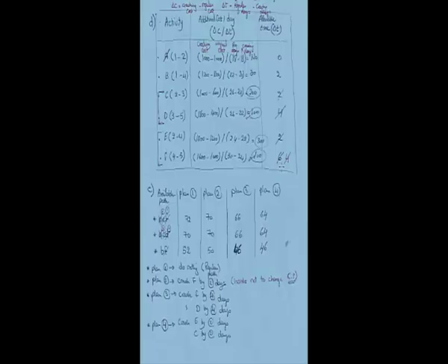The next activities are E and F. We've got them right here. The additional cost per day for E is 300 and for F equals 100. Which is less costly to us is activity F, so we're going to choose to crash F. By how many days? The allowable time available from activity F is 6, which we have calculated right here.